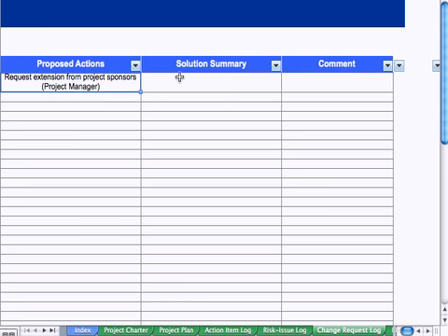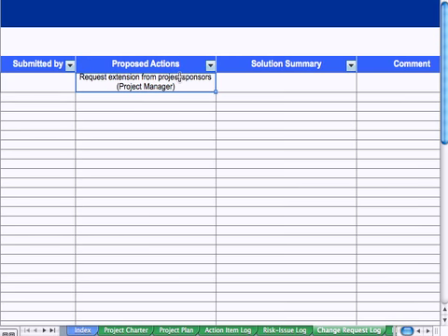Is that okay? You're probably the one that's going to advise on what decision to make. But in the end, since you're moving a milestone, that's something you would escalate, which means you would bring it to senior management for some type of approval.